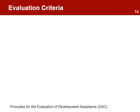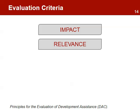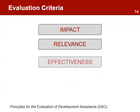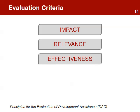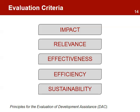When evaluating progress and a project, it is suggested to consider the following criteria: Impact — how and to which degree does the project contribute to the solution of the problem? Relevance — does the initiative make sense in terms of the condition, needs, or problems to which it is intended to respond? Effectiveness — what progress is being made toward the achievement of results? Efficiency — have resources been used in the best possible way? And sustainability — will the results and benefits continue after the project has ended? These are the principles for evaluation of development assistance.